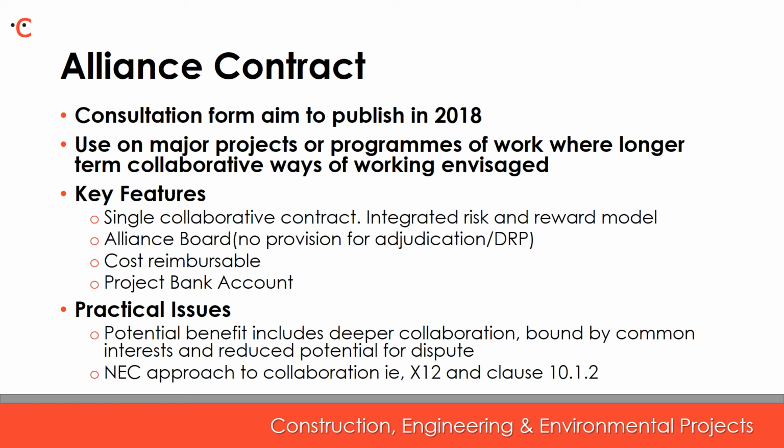The alliance board will be responsible for resolving disputes, and whilst there's no reference to a formal dispute resolution process by adjudication, etc., nonetheless, clearly, if the contract is caught by the provisions of the Housing Grants Act as a UK domestic contract, then adjudication under the scheme will apply if not allowed for under contract. The contract uses a single contract data for all parties, created by mutual agreement, with payments made into a project bank account.